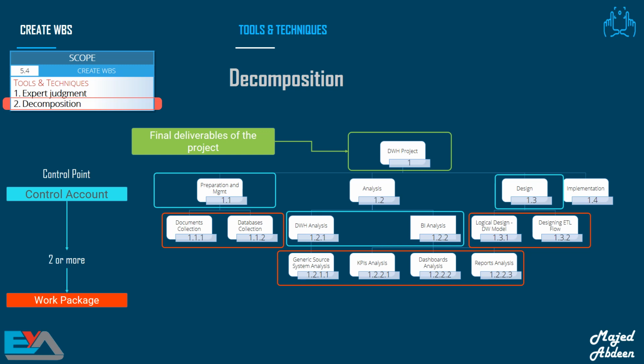Sometimes, the actual management of the work packages is supervised and performed by the line managers, who report the status to the project manager at high levels of the WBS. The concept of decomposition is breaking down, dividing, and subdividing the project scope and the project deliverables into smaller and more manageable parts. You can then estimate and manage both the cost and the duration.